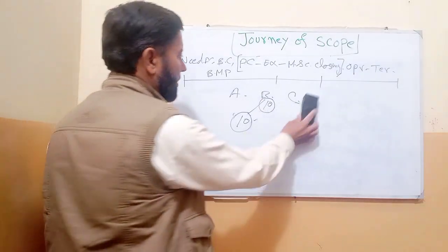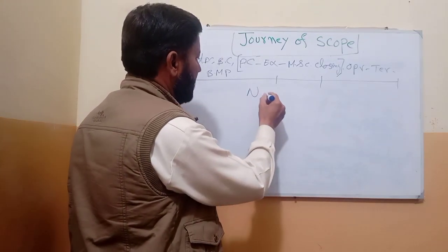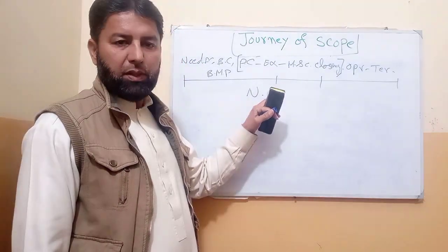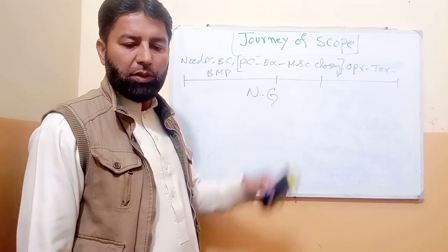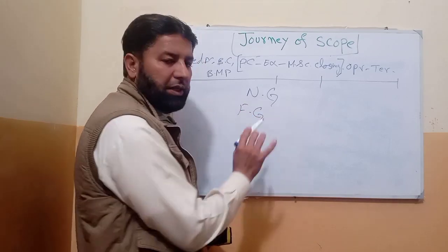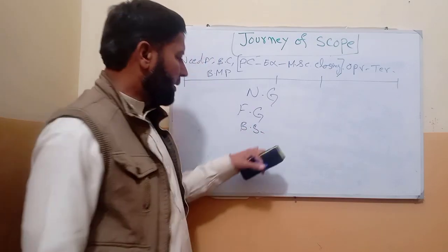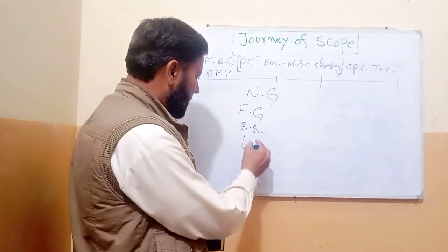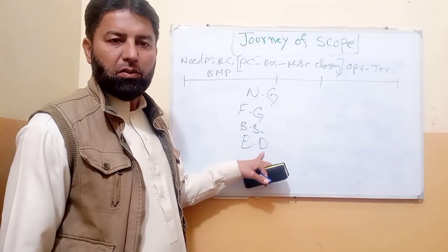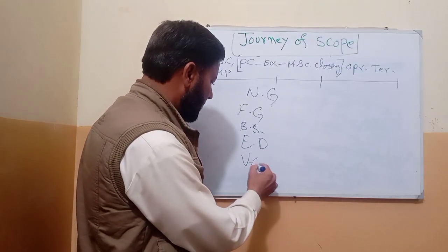And another technique I will explain to you, nominal group technique. This is basically 4 tools and techniques used inside the nominal group technique. Focus group came, they generate ideas in brainstorming and we classify those ideas in affinity diagram and then we rank those ideas using voting.